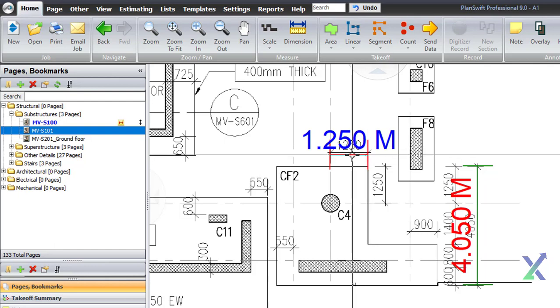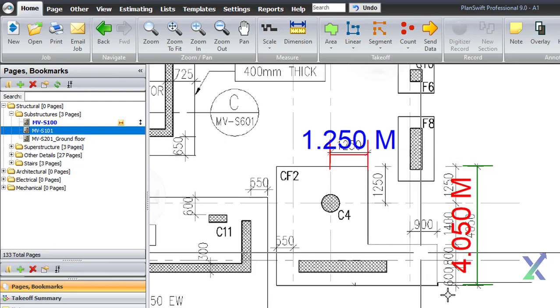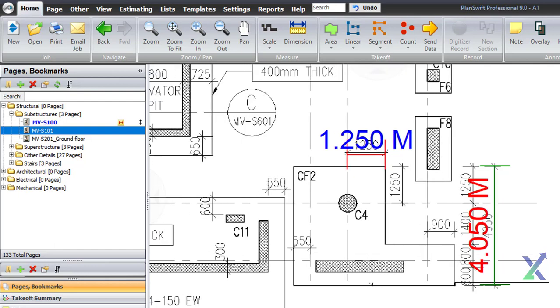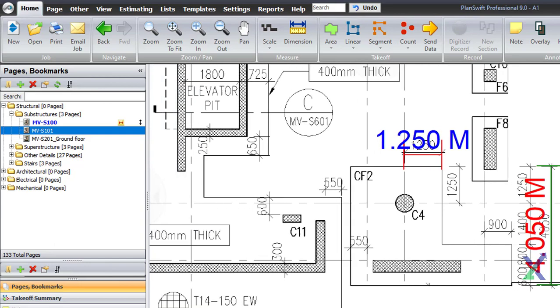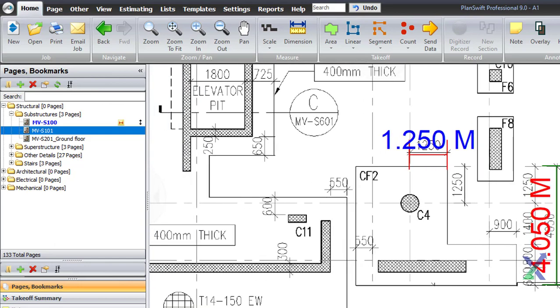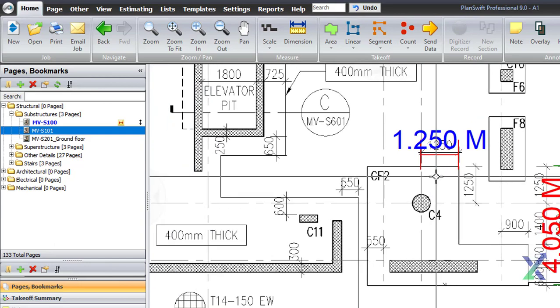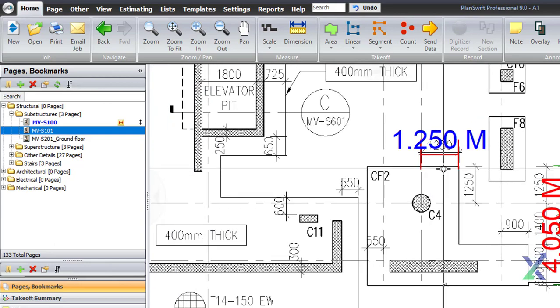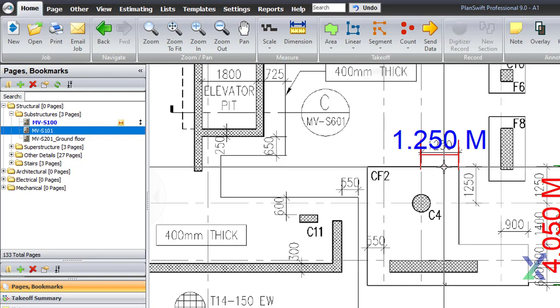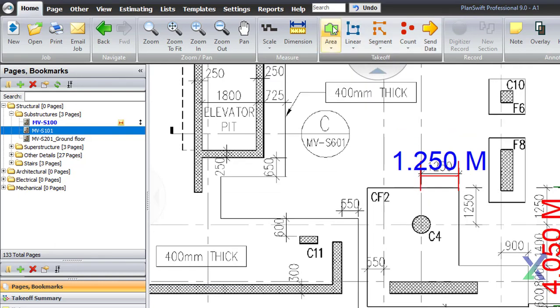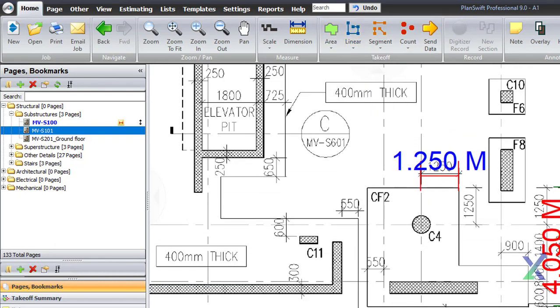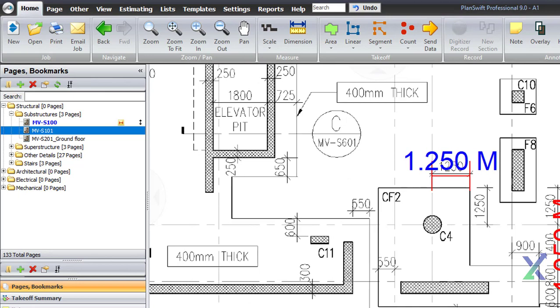What I choose to do is to measure the area and assume that they have all the same thickness. You can choose to estimate more accurately based on the footings schedule, but remember that this is primarily for planning purposes and not for precise quantity surveying.